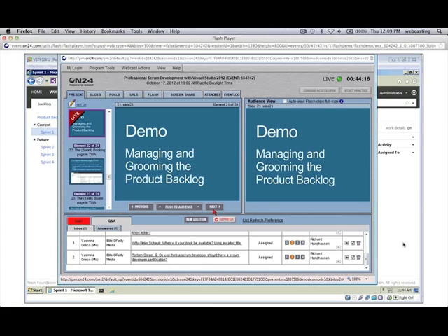You can see a roll-up of hours. You can see how many hours left given our daily estimates of what the work remaining is per PBI or bug fix, as well as how that affects the sprint burn down. So given the number of days left in the sprint and given our estimate that we have 180 hours of work total to do, we think we can make the sprint review or not?